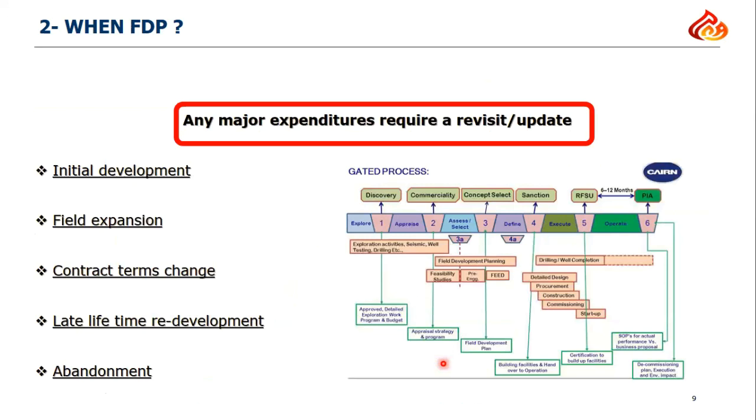No, this is the common one. But actually there is another time frame within which I can generate a field development planning or revisit our original field development planning or update our field development planning. When this should happen: during any major expenditure. If I need to install or study to install water flooding after the primary cut, I should update and revisit the field development plan or generate another field development plan.